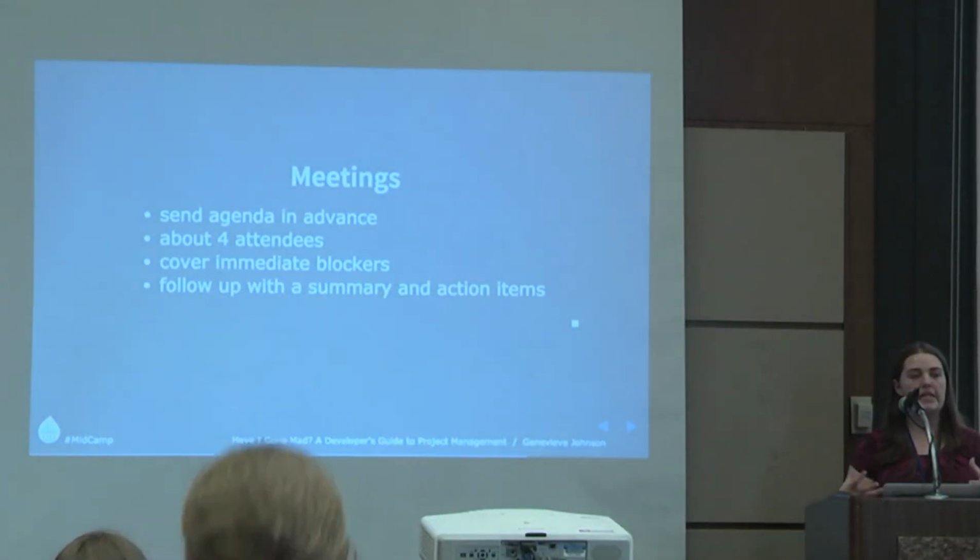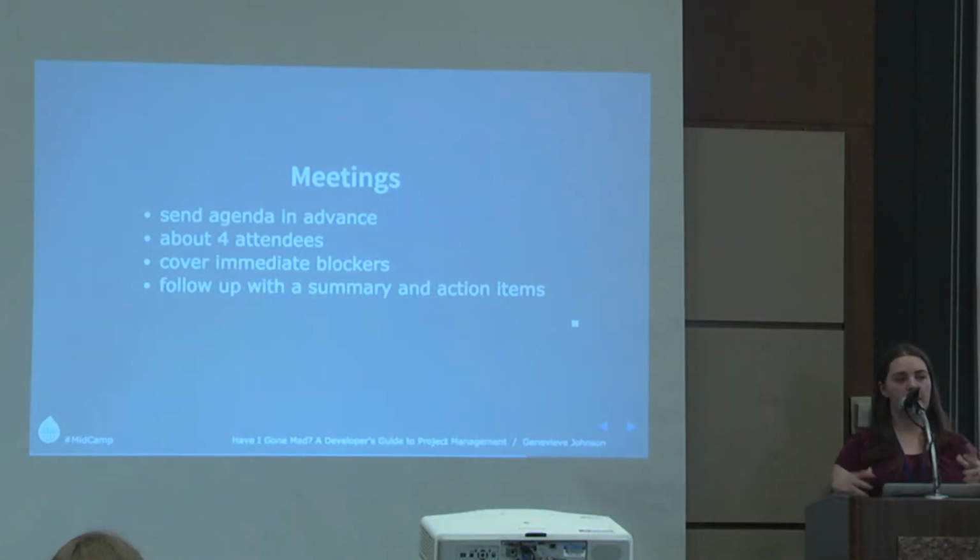And it's really easy as the project evolves for more and more people to want to come, especially as different groups from the client side maybe get involved in different features you start working on. So being just aware of who's coming to your meetings, and do you really need all of them, or can you pare it down to just those decision makers? I've usually found that having about 4 people at every meeting is about where you want to be. If you start to get more than that, then just be really careful that you have who you need.